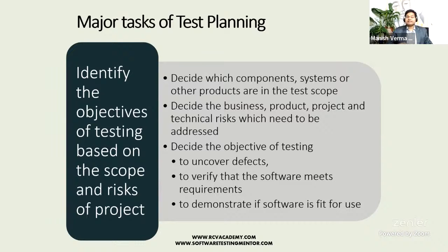Say, for example, there is an external vendor supplying a particular component, some web services. Is testing of those web services in our scope or not? If the vendor's contract says they will develop those services as well as test them and provide us completely tested endpoints, then that is not in scope. We will mention in our test planning that this is a vendor service, and we'll just be consuming it.